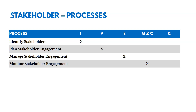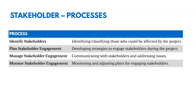There are four processes in this chapter. One's in initiating, one's in planning, one's in executing, and one's in monitoring and controlling. We're identifying stakeholders in initiating — identifying and classifying those who could be affected by the project. In planning stakeholder engagement, we're developing strategies for how to engage with those stakeholders. In managing stakeholder engagement, we're actually communicating with stakeholders and addressing issues as they arise. Then we monitor those relationships over time and make adjustments as needed.